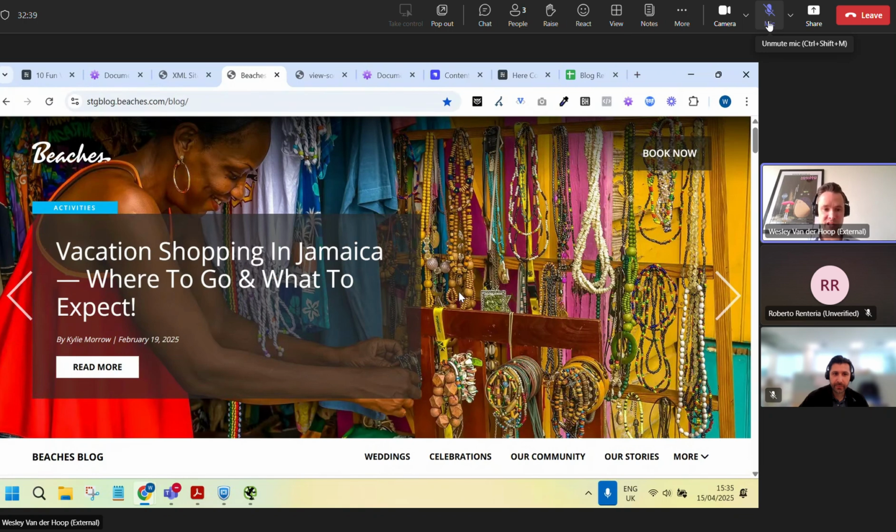And you're gonna have a kickoff meeting. If it's not repetitive, it's probably more difficult. But projects like these, always ask for a process and a sheet. So you look at the challenge, you break it down in steps. How do we get from A to B? And then you assemble the team and the timeline, and then the kickoff meeting, and then it's just doing things. So that's basically how we would do it.